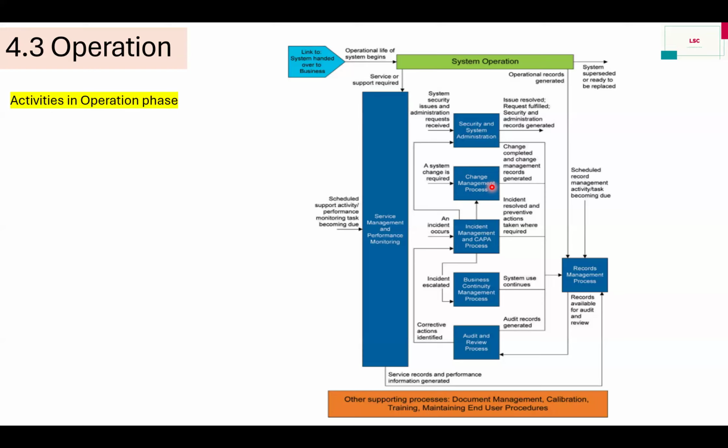So configuration management includes those activities necessary to precisely define a computerized system at any point during the life cycle, from the initial step of the development throughout the retirement. It should be precisely working. A configuration item is a component of the system that does not change as a result of normal operation of the system. Okay. So this comes in the configuration management.